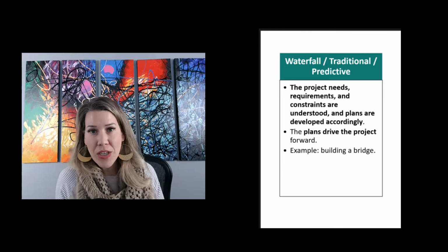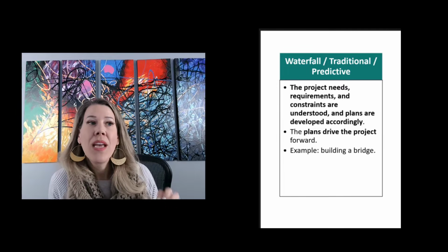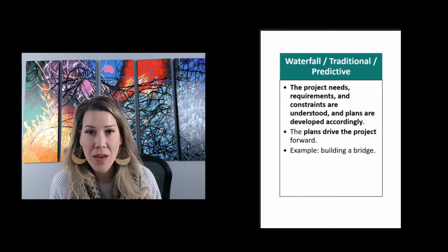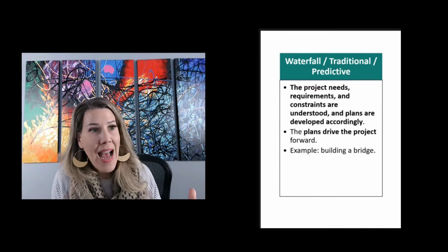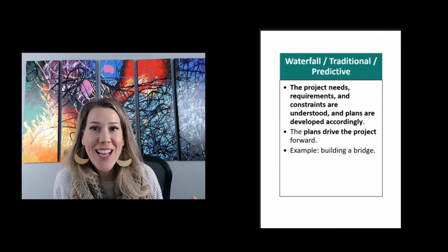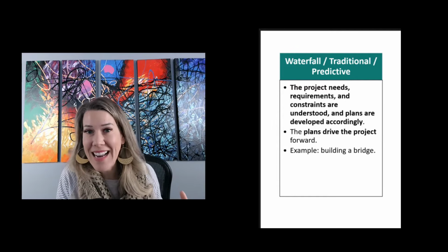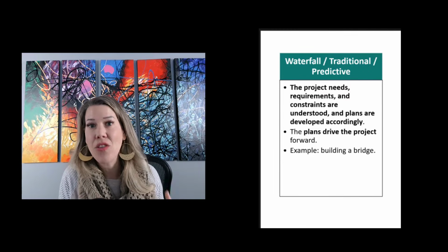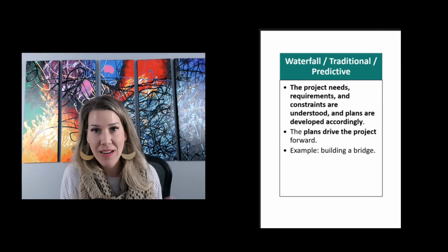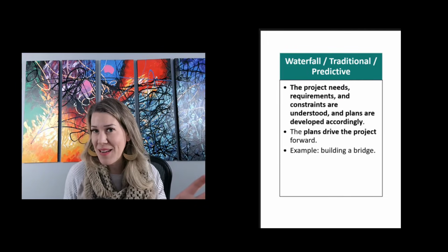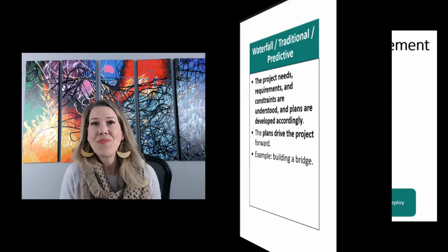Now, when would you use waterfall project management? This is generally used when requirements are well known. So building a house, building a bridge, you can imagine that you'd want to have a full plan developed before you just start building a house, or you're going to have a lot of expensive changes throughout that project execution. So when requirements are well known, this tends to be the best approach.